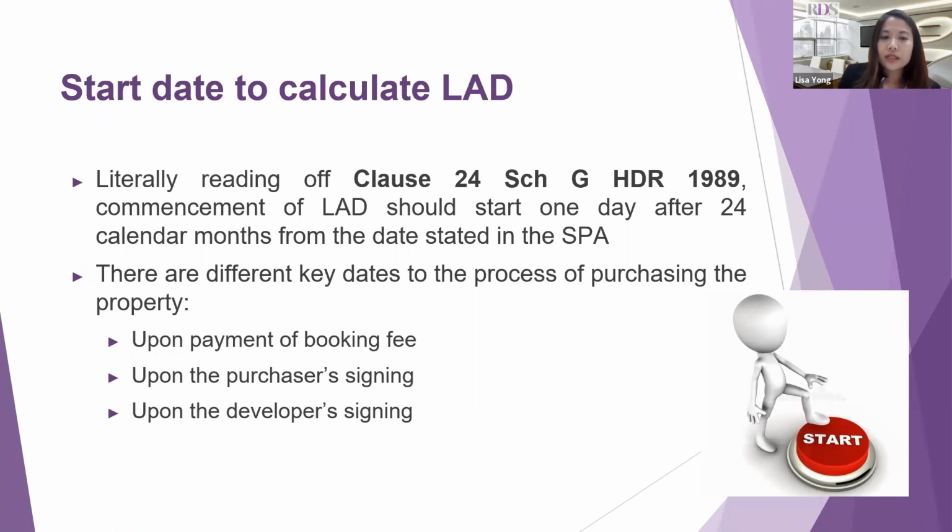So prior to the decision in PJD Regency, there were actually two conflicting Court of Appeal decisions related to the calculation of LAD, on whether time starts from the date of payment of the booking fee or from the date of signing of the SPA.